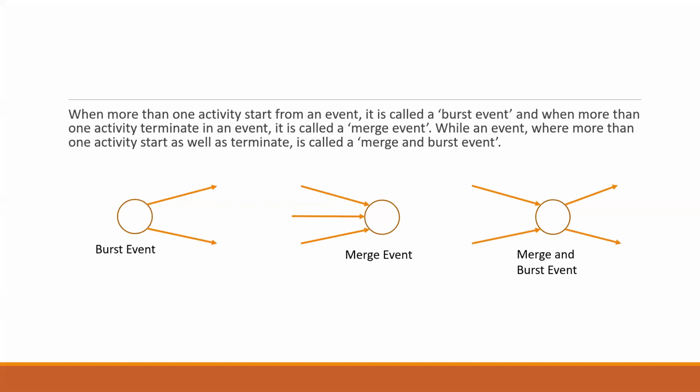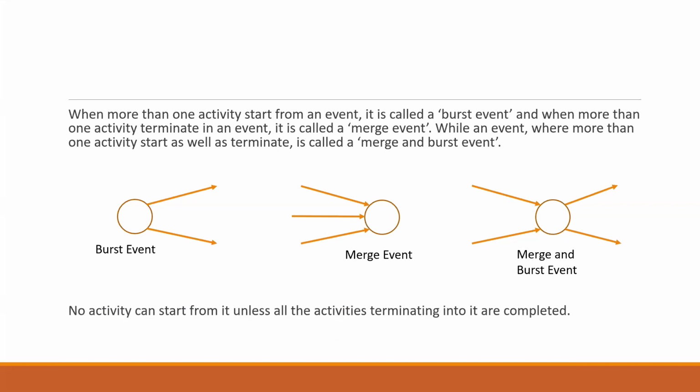Please remember, you can use any of the techniques while drawing the network diagram. Either you put the activity in the node, or you can put it on the arc. Please remember, no activities can start from it unless all the activities terminating into it are completed.